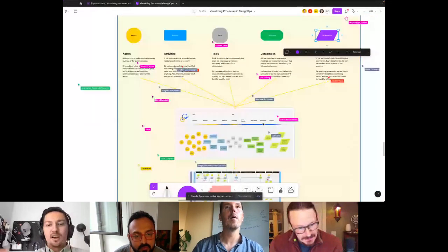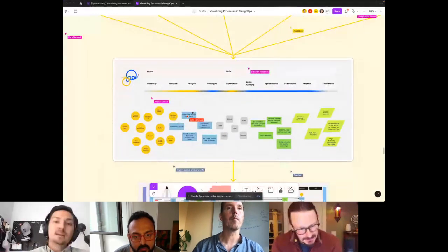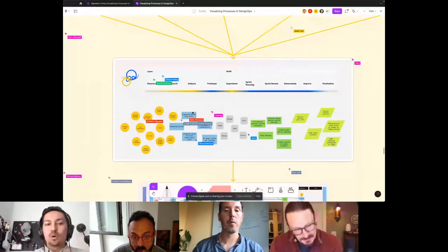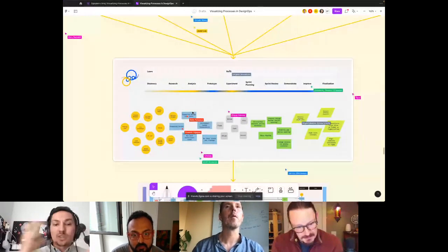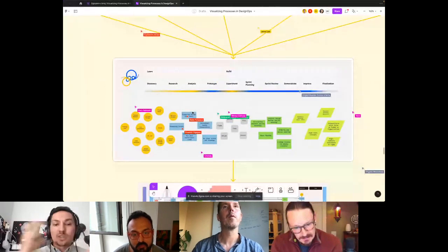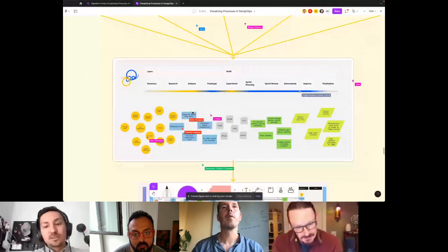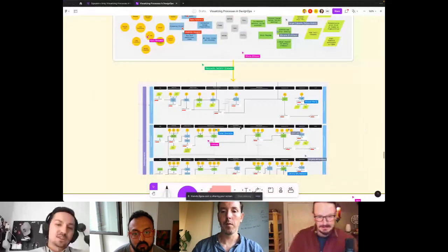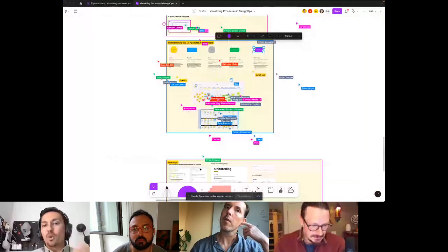And one of the workshops that you could do together with your team when you're just starting and you would like to solidify the process is to ask people to work in groups and come up with all the actors that they know might be involved in the process, without structuring and connecting the dots and visualizing them in the timeline. Or maybe asking people what kind of activities they're performing, which kind of tools they're using. And when you have these clouds of different components, then you can start visualizing and connecting the dots all together, finding the missing spots, finding the weak spots that will help you to understand that, oh, we need to improve the way we would update that.